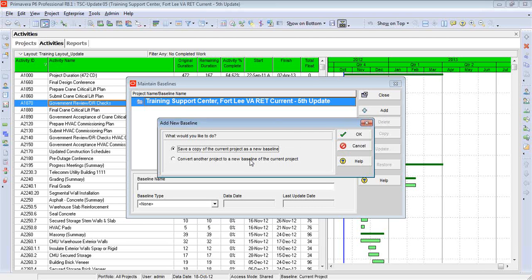The second option — convert — is when you want to go much further back. Let's say we're working on the 15th update and we'd like to compare how this schedule looks with the 12th update, or maybe go all the way back to day one with the original baseline schedule. Because we're not trying to make a copy of the current schedule, we're essentially copying and attaching another schedule as our baseline. That's a much different procedure. I want to focus on the first option today — making a complete copy of the current schedule, the fifth update.